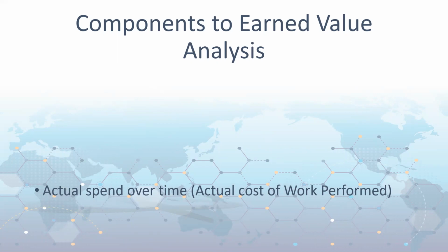So because of disparate systems, you might have a P6 schedule that's got all the resource loading and all the planning, and that gives you a nice budgeted cost of work scheduled. How do you determine the percent complete in that tool? Not that easy. So you need to determine other methods for doing that. And then you've also got all of the spend that's happening in the accounting system or in timesheets and other financial products, and that doesn't necessarily integrate neatly into that schedule.